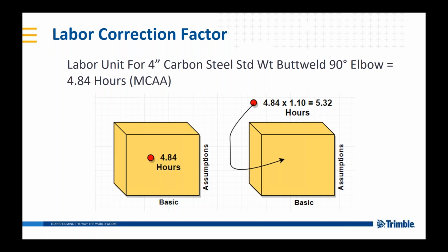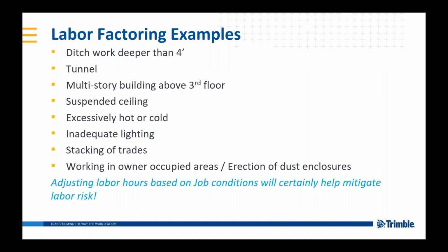And another way to illustrate that line item takeoff factor would be if you're installing at 8 foot high across a room, with no factoring applied, and then all of a sudden you penetrate through a wall and that ceiling jumps up to 20 feet high across a room. That height factor would be applied as you cross that 20-foot ceiling until that condition no longer exists and you drop back down to the 8 foot, for example. So there's some examples of applying labor correction factoring.